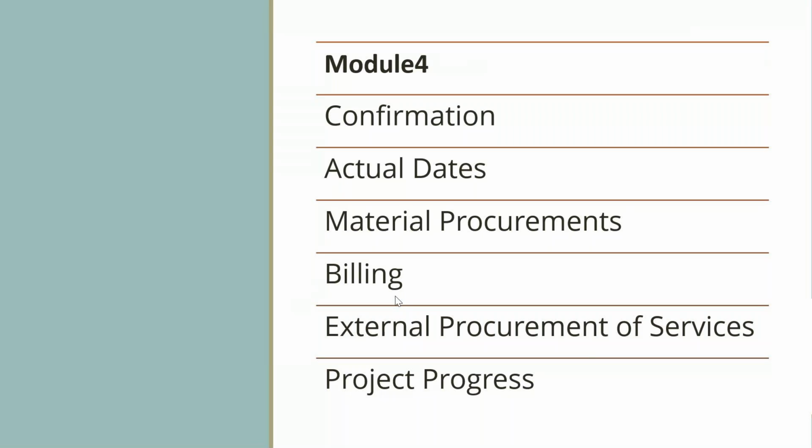In the project, directly, a project will be created, and the schedule and everything will come back to the SD team for quotation. So they can then tell the customer this is the approximate timeline and this is the cost you'll have. Then SD can give the final quote and get the order. Once the order is done, the sales order is created and linked to the project. Based on the milestones of project completion, the billing will happen.